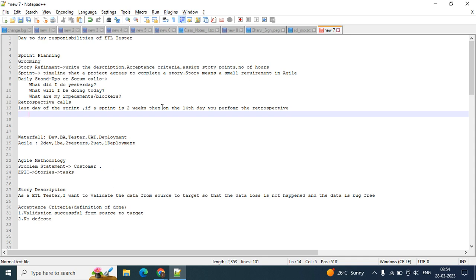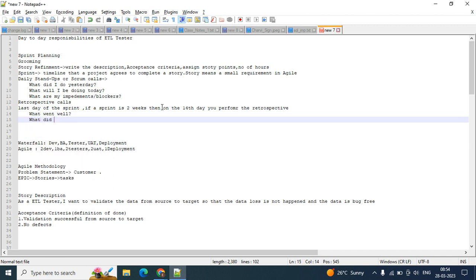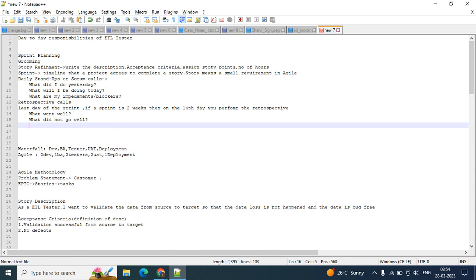So what will happen in this call? In this call we'll say what went well, what did not go well, and what the solutions are to make sure these problems are not repeated.